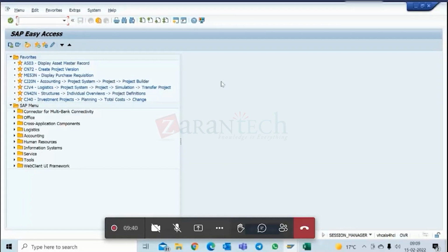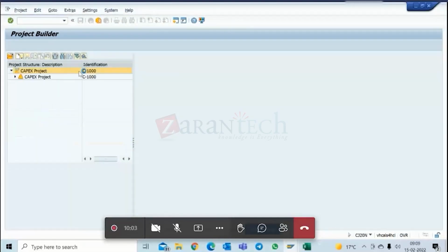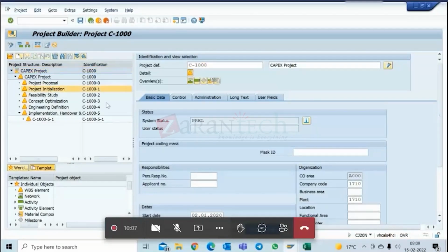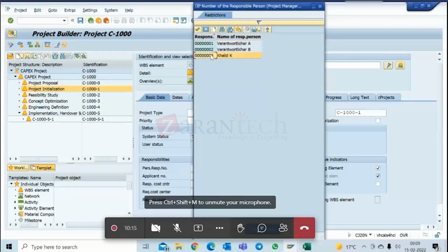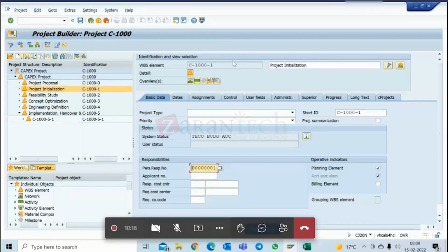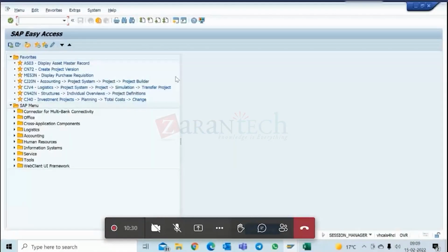Budgeting: we saw the configuration of budgeting, how we can put tolerance limits, so that at 90% it starts giving a warning message, at some higher percent it gives an email to the responsible person. Then the third one is stop transaction, that is an error message. Now where is this responsible person? The responsible person is here at WBS level, in this field. So the email will go to whoever we maintain over here. In the configuration we maintain the user ID also for the responsible person. I will show you that.